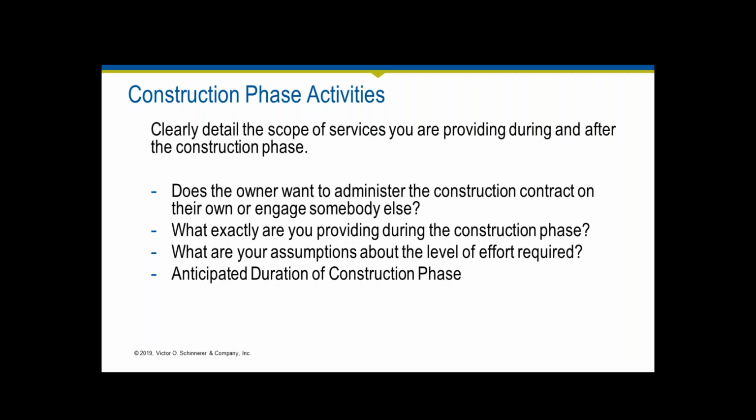I think that is one of the reasons why a lot of firms lose money during this phase, because they don't have a detailed scope, and they're still called on by the owner to respond to questions, to respond to issues, even though you don't have that responsibility during that phase. So it's important that even if the owner wants to say, we don't want you involved, you need to say to the owner, okay, do you want me involved in any shape, form, or manner?